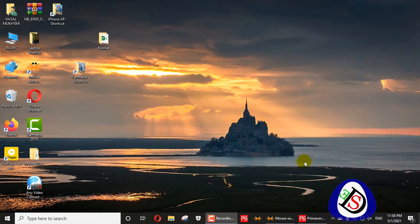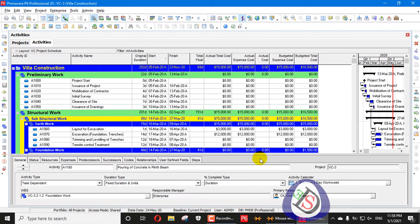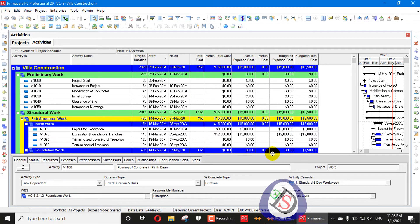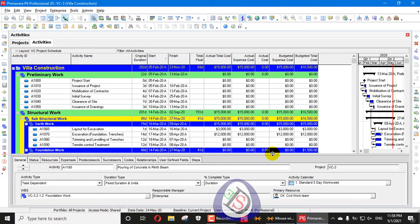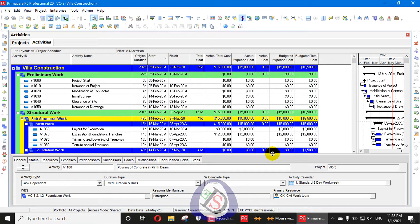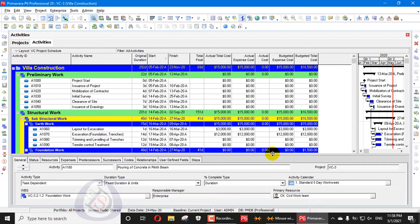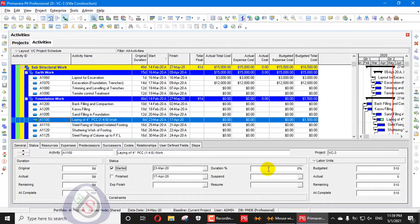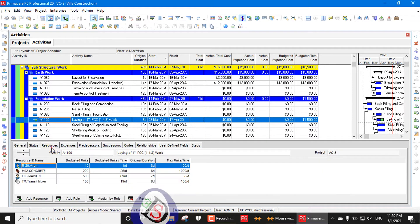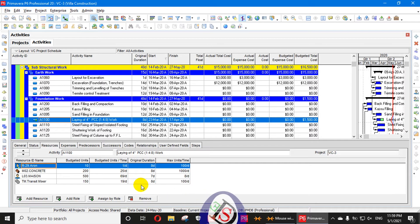When you update your project, there are some problems. You cannot go back from the original updated progress because a project having actuals in its cost, in expenses, in actual units — you can't delete them easily. If this activity has actuals, you can't delete it. You have to go to resources and change all the resources from there.